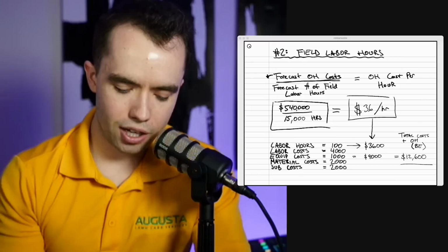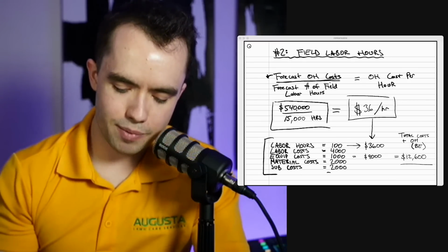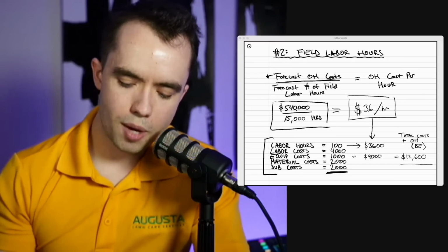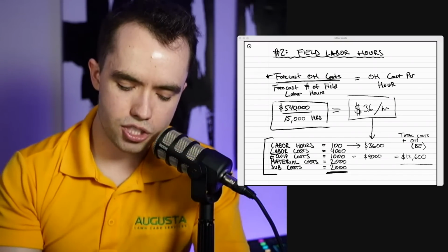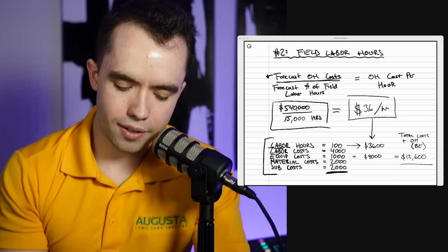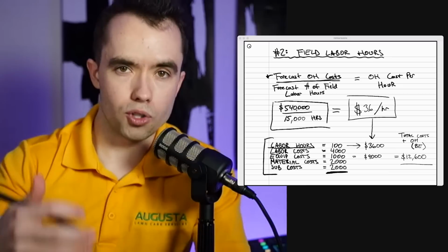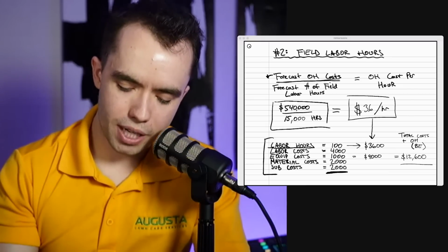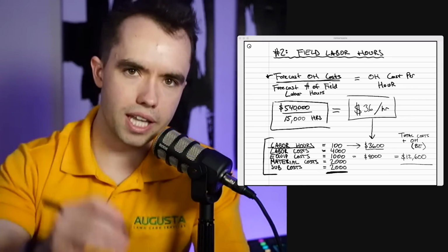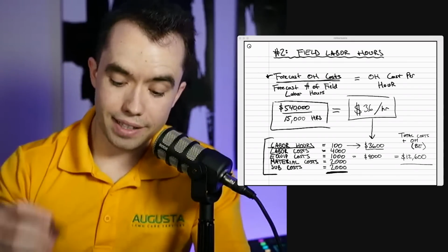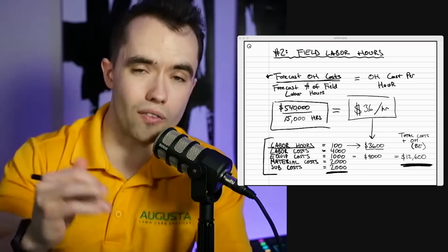So now if we look at our cost of goods sold down here, this $9,000 job, again, a fictitious job, same $9,000 of cost of goods sold, but now we're going to add $36 per hour. In this case, we are assuming the labor hours right here, 100 labor hours on this job. So if you take 100 labor hours, multiply that by $36 per hour, we come up with an additional $3,600 of overhead recovery using the labor hours method. And now the total cost for this job, the break even, I should say, is $12,600.